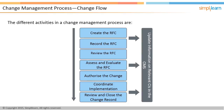Finally, the implemented changes are reviewed in a Post-Implementation Review, or PIR. If the change is successful, it can be closed. A key activity of change management is the assessment of the change request, either by the change manager or the Change Advisory Board.